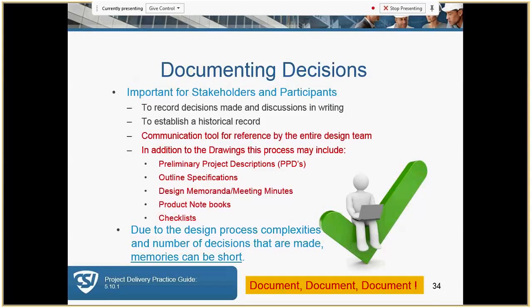And I particularly prefer that the OPR does get updated, because if you are pursuing a LEED project, that documentation is provided to GBCI as well. And that way you can explain why something was commissioned or was not, or why that change was made.